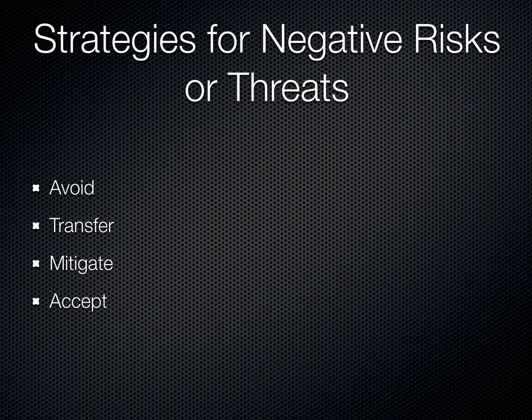In addressing negative risks or threats, there are 4 commonly used strategies: avoid, transfer, mitigate, and accept, where each strategy is usually circumstantial to the risk. The avoidance risk strategy is used by a project team to eliminate a risk or protect a project from its impact. An example of this being implemented would be to change an objective, meaning extending schedules, changing strategies, or the scope.